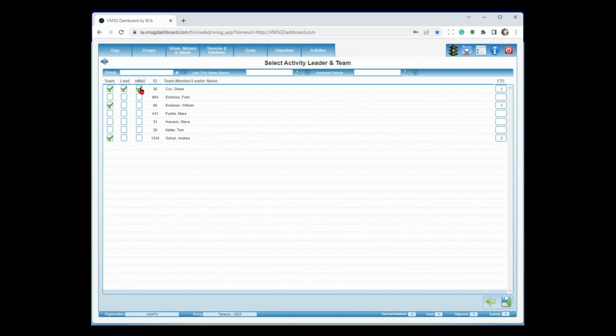Email notification is part of what we call real-time planning. Real-time planning allows you to update all the elements of the plan directly from the source, if you will. In this case, from Diane. Diane's going to get an email from the system. It's going to link her back into the system to write to her activities, and she's going to update that, hey, we're 50% done with this training content. And we're going to talk a lot more about real-time planning in a few minutes here.